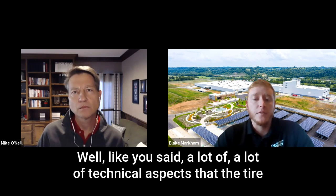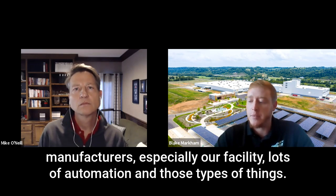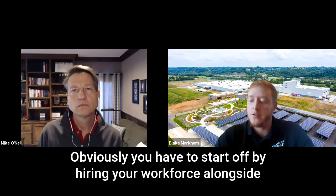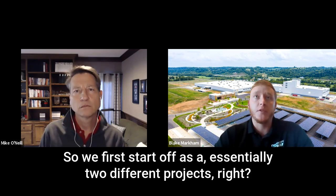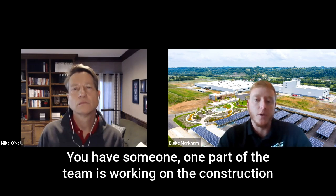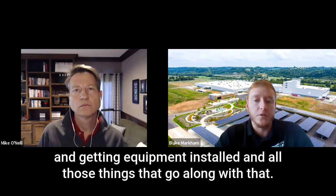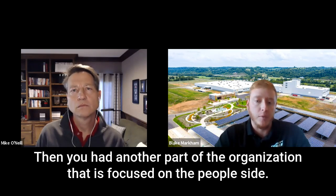Well, like you said, there are a lot of technical aspects to tire manufacturing, especially at our facility. Lots of automation and those types of things. But it's a long road. Obviously, you have to start by hiring your workforce alongside the construction project. So when you first start off, it's essentially 2 different projects, right? One part of the team is working on the construction and getting the equipment installed and all of those things that go along with that. Then you have another part of the organization that is focused on the people side.